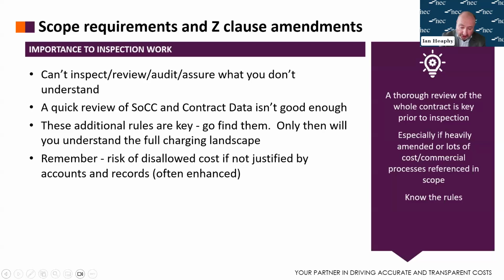And if there is a situation where the project manager maybe wants more evidence, there is the ability to change the scope post-contract. The amount of information can be refined. Okay, it's a compensation event. It may lead to an increase in the price of the job.